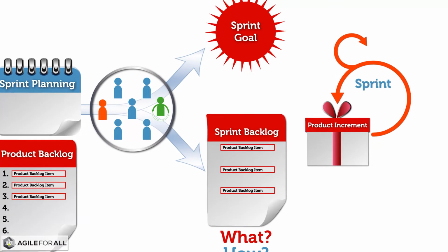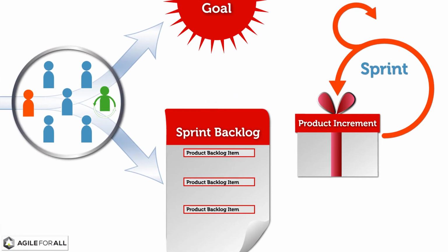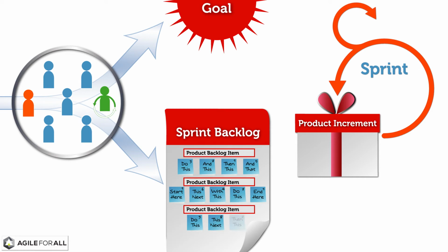The sprint backlog also contains the development team's plan for how they will deliver the product increment and realize the sprint goal. The sprint backlog makes visible all of the work that the development team identifies as necessary to meet the sprint goal. The sprint backlog should provide enough detail that changes in progress can be understood in the daily Scrum. The development team modifies the sprint backlog throughout the sprint as they work through the plan and learn more about the work needed to achieve the sprint goal.